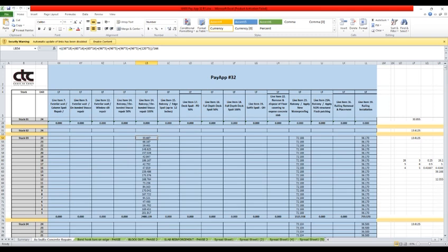Yeah, so the question was, as I understood, about the quantities of the stucco. Can you see my screen? Yes, I can. Okay, so you can see riser number 3, and these are quantities for the stucco. 24th floor, 23rd floor. So all the numbers are here. In total, riser 3 was 2,480 square feet. He asked also about the backup. For example, let me go to the backup for riser 3.